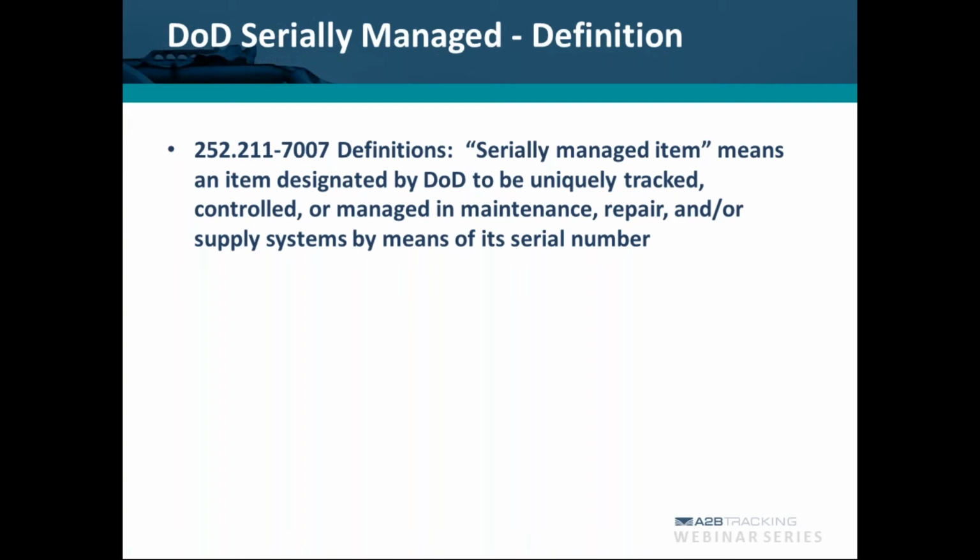Two of the e-tools from DCMA are exceptions. PCARs and loss reports that are reported through those systems will be reported to the registry through the system. Contract transfers will definitely require updating the IUID registry. So even if you put it in PCARs as a contract transfer, you may get okay to have the contract transfer. However, it will not update the registry. You need both the losing and gaining contract modifications in order for that to happen.